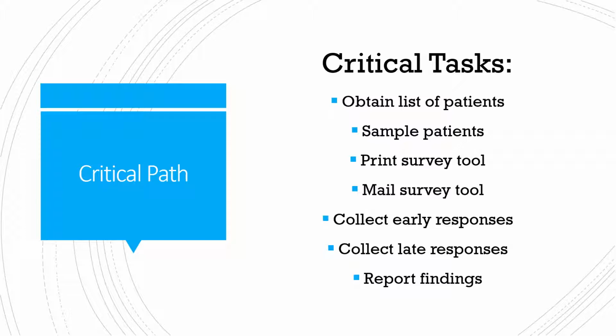So among the top option windows where you can select things like task, resource, report, go to the view tab, and somewhere along in there, I think to the right or in the middle, there's an option called highlight, and you open up the highlight drop down and you select critical. And once you do that, in your task view it'll highlight the critical tasks in yellow, and this just makes finding the critical path that much easier. And after doing that process myself, these are the critical tasks that make up the critical path for this given project.